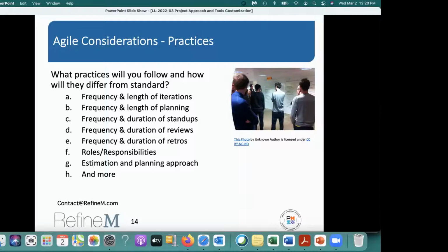But the approach should be that you don't need any other role, because every team member in a Scrum environment should have multiple skills so that they can finish a story start to finish. That's the assumption behind not having so many roles. Each team member is a multi-skilled person. If you are not at that stage, that's understandable, because the teams are in transition.